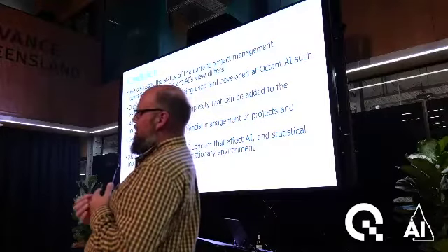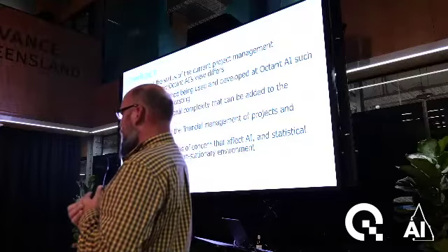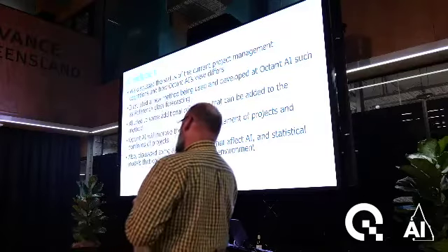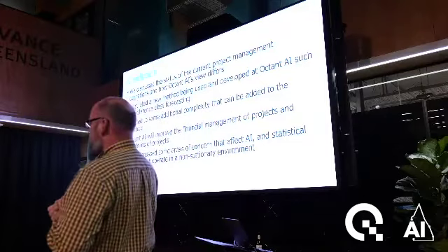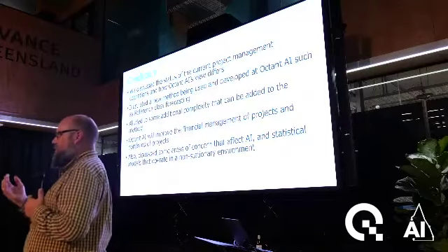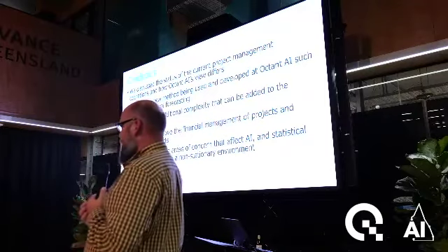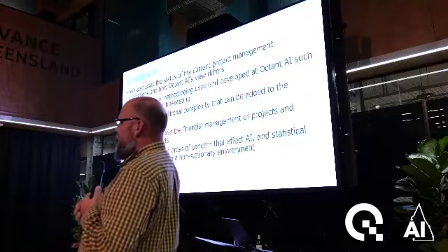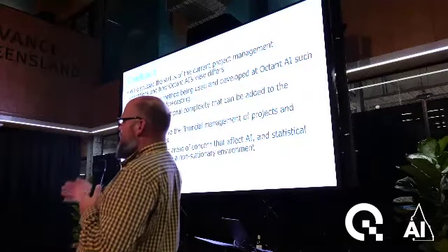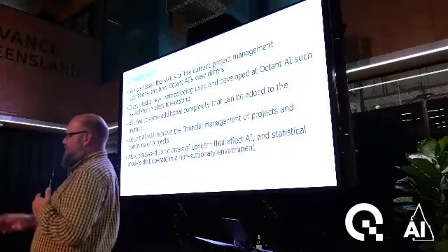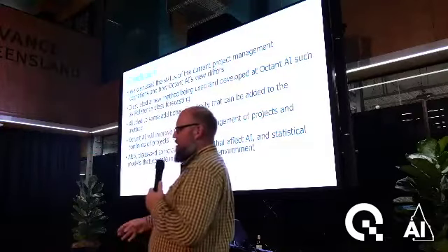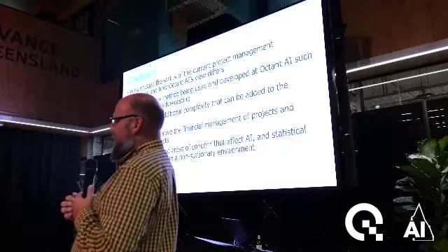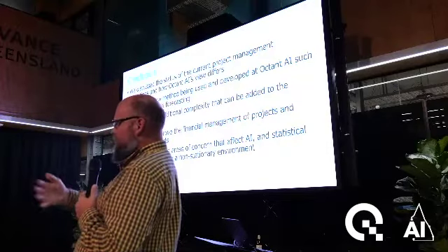But the issue is how you're going to get, for example, correlations between things, because some of them may not be public. So again, someone's going to make a guess. Also, where people think projects are unique, what's happening is maybe the weights of exposure are different on different commodities. A certain project might use more steel, another might use more concrete, so there'll be different exposures. But that's something you'd have to estimate somehow and put in.